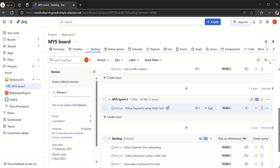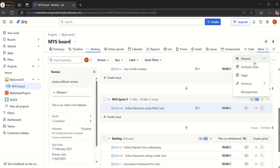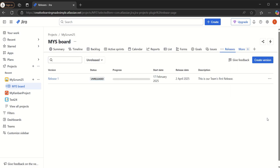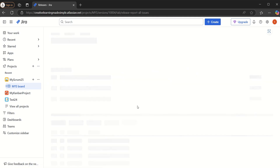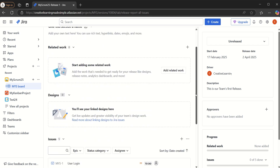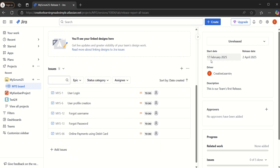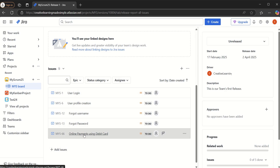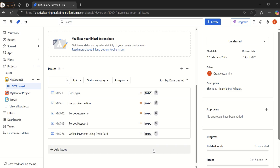If we go back to Releases and click on Release 1, it shows us the progress — what has been completed. Our team has planned that work started on the 17th, the release is on April 2nd, and we are trying to complete these five user stories and release them on April 2nd. This structure helps us prioritize work and target certain releases and milestones. In an agile team, it all depends on how well the development and execution go.